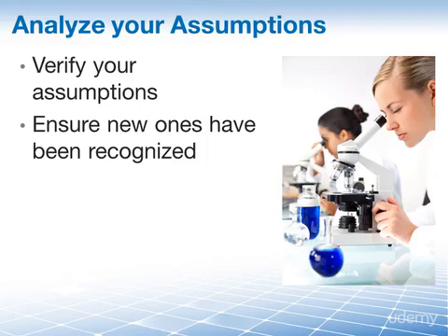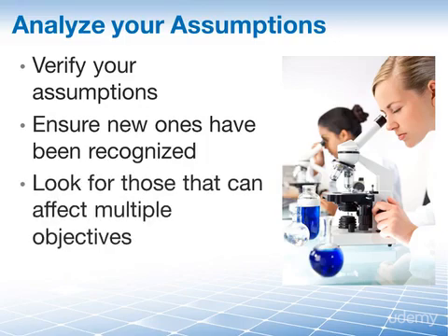Some assumptions carry more weight than others because if proven invalid, they could affect multiple project objectives. Reliance on a single supplier that experiences a setback could leave you scrambling and could affect your ability to deliver on schedule, at a particular cost, and at the quality that your customer is expecting. Again, that is risk that must be identified and analyzed. And finally, you should confirm that assumptions are consistent with themselves and don't contradict other assumptions.